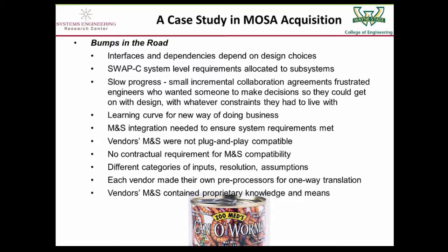Now we get to where things got a little stickier, which was that while there were requirements about the system interfaces, openness of the interfaces, and integration of the parts, that did not extend to the modeling and simulation tools that the vendors were using. Some degree of system-level M&S integration is really needed to see that all these parts, when they're integrated, will achieve the performance that was expected, but the M&S tools were incompatible. They were not plug-and-play compatible at any rate, and there was no contractual requirement for that compatibility.